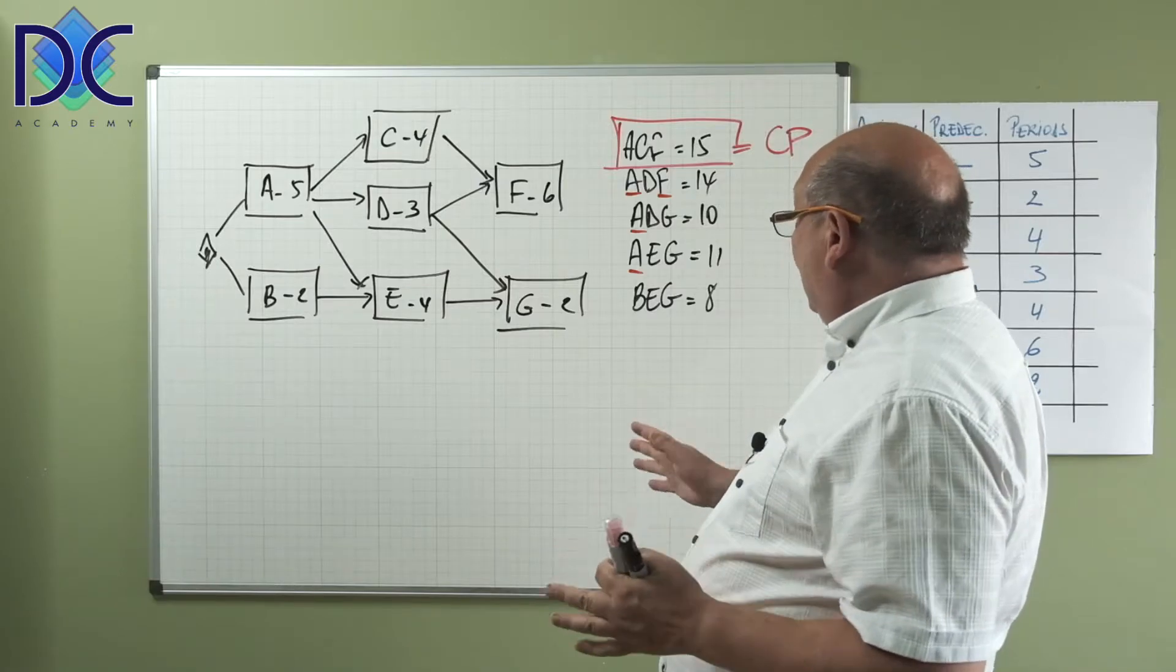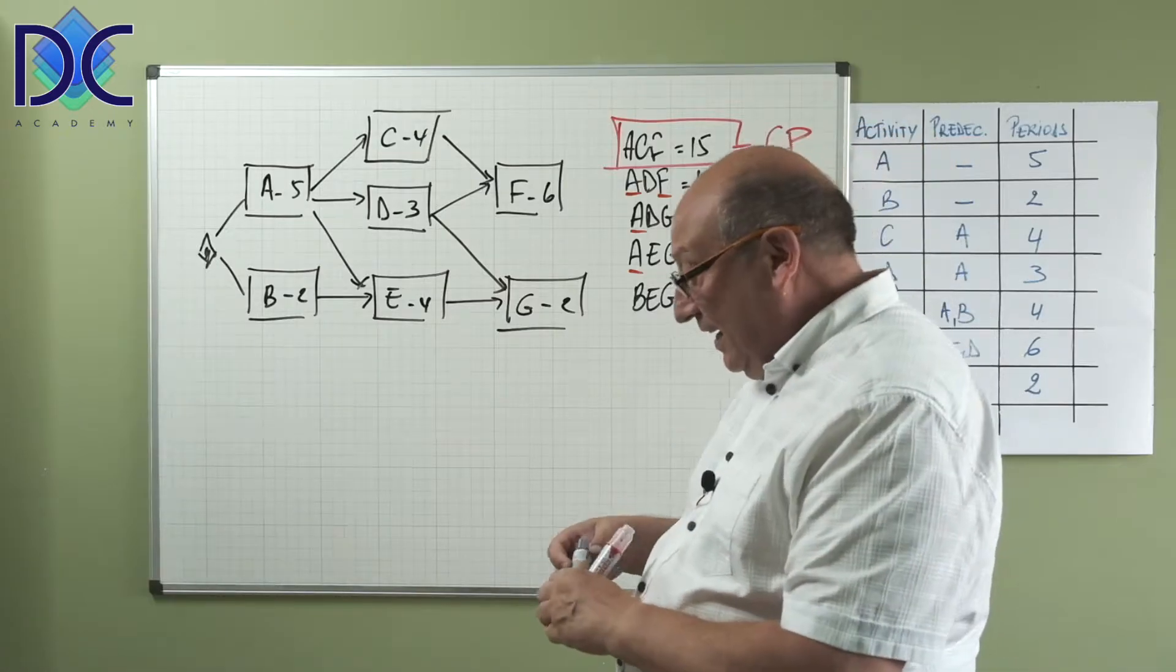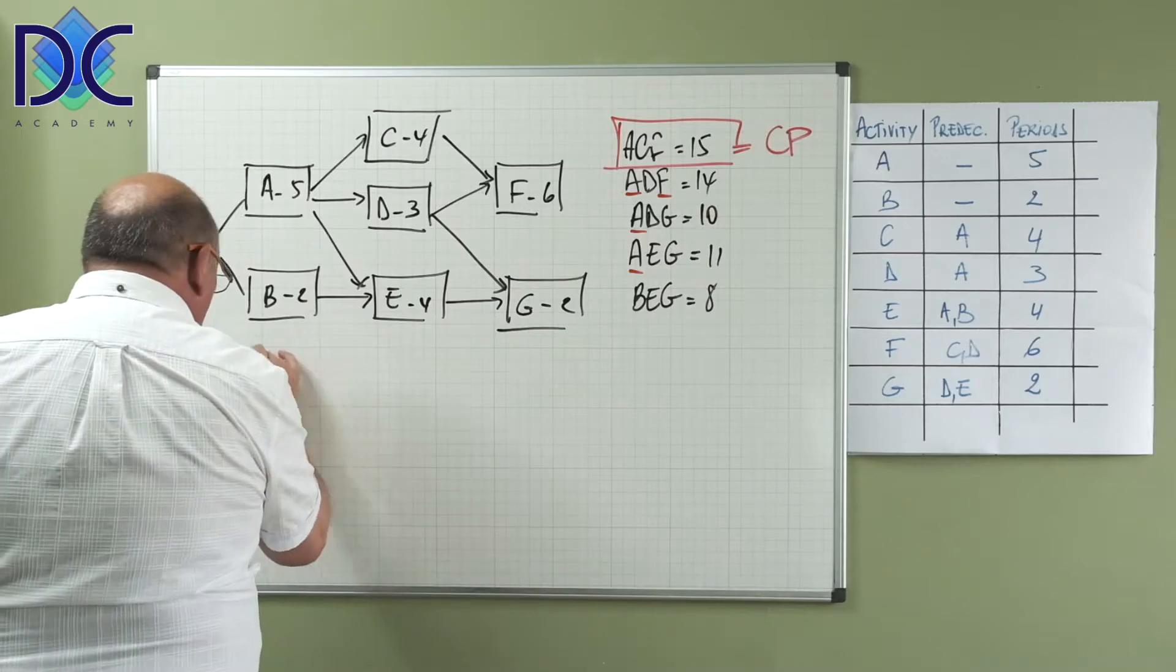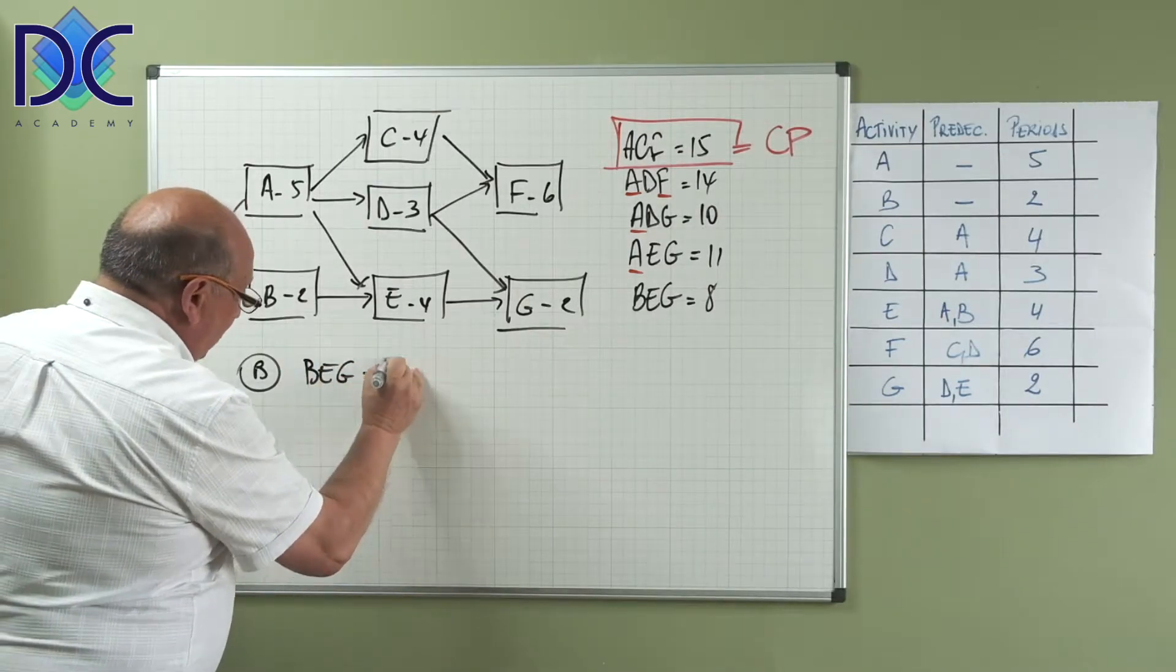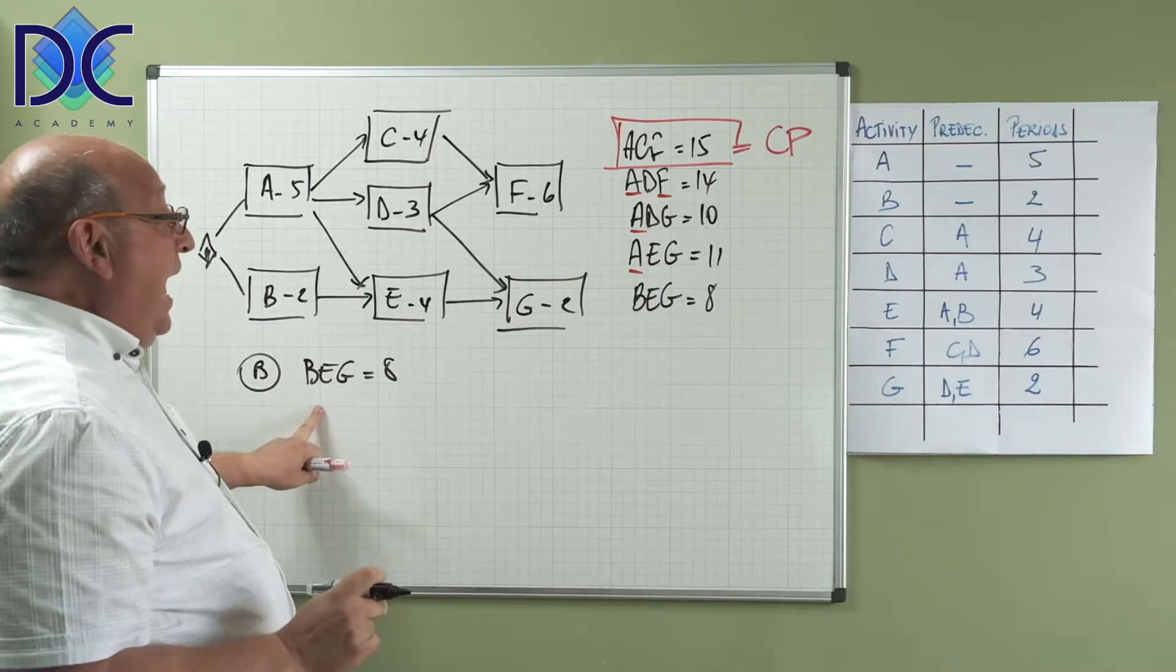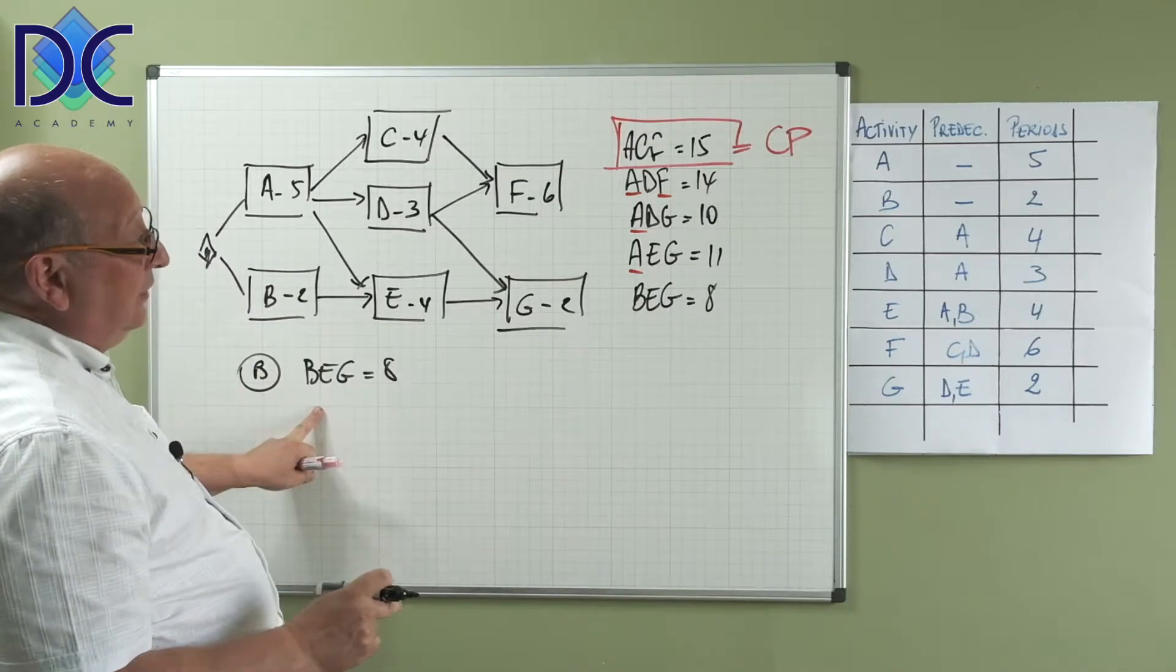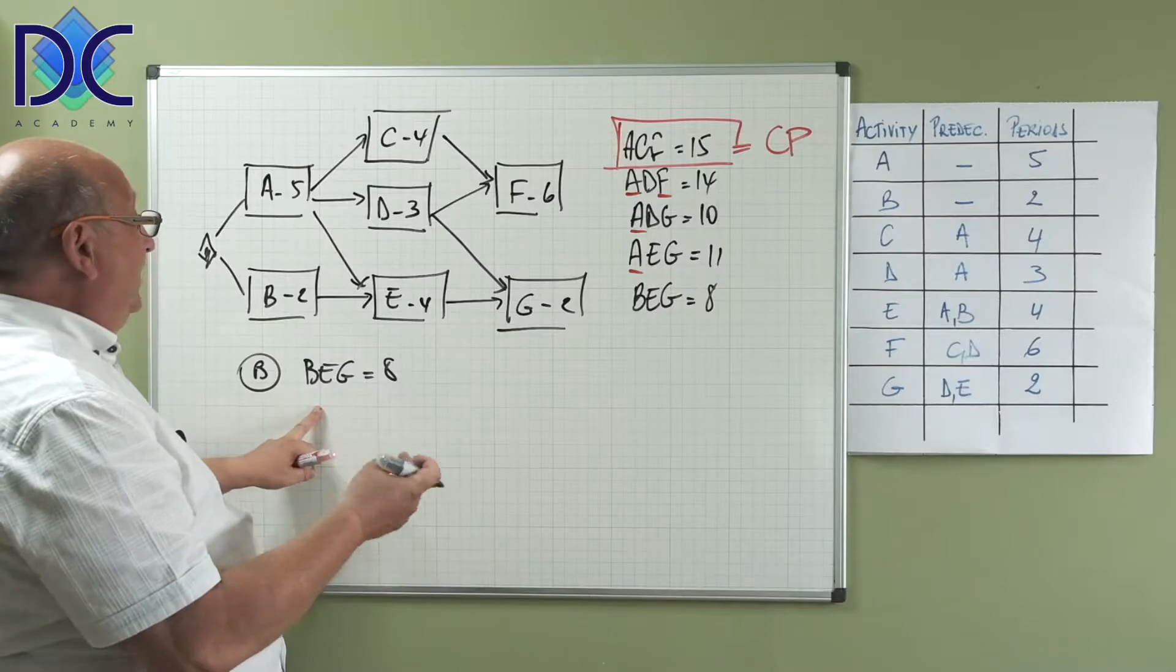Now let's look at activity B. For B, we have B is on the path BEG with the duration of 8, and we have to compare this with the critical path.